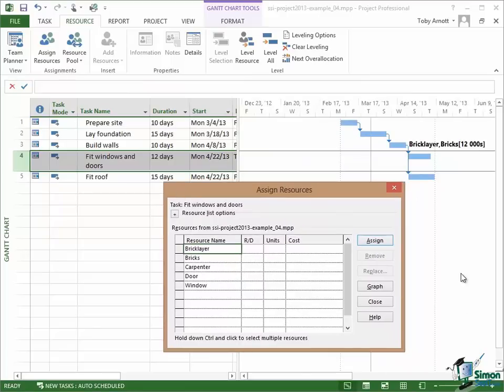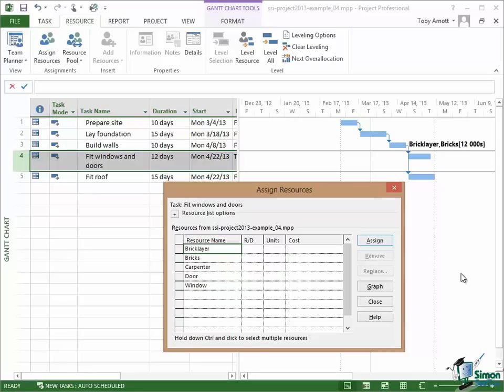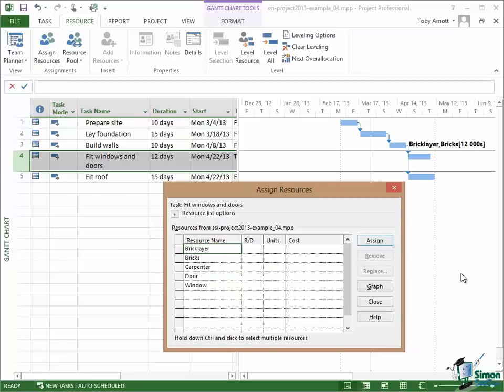And I'm going to leave you now with this as your next exercise to do because for Fit Windows and Doors what I'd like you to do is to use one carpenter and there are going to be 12 windows and believe it or not nine doors. Now you may think most houses don't have nine doors but this is internal and external doors. So 12 windows and nine doors and one carpenter assigned to that task. I'm going to start you off at Example 5. So you open Example 5 to do this and my answer to this is Example 6. That's it for this section. I'll see you in the next one.